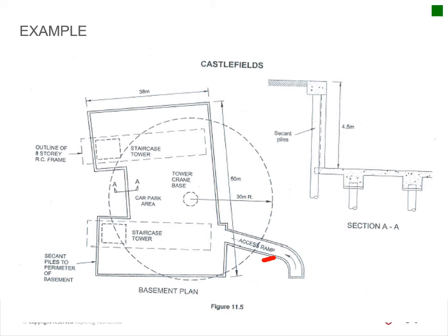And then there will be a pedestrian access via scaffolding access towers. The volume of the excavation material is approximately 9,800 squares, and then the program duration for the works is 4 weeks or 20 days. Okay, so then they can calculate, okay, I need X amount of trucks coming in. So you will see that on page 250, where they actually do the calculation of machine output. There's 25 loads per day that they have to take out.